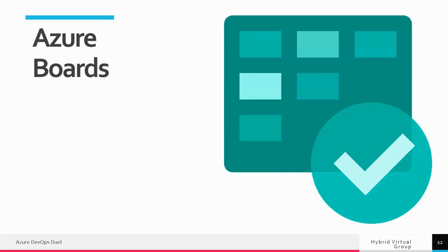Anyway, we better discuss Azure Boards since I'm going to be using it to organize our backlog items. Now, Azure Boards is the service within Azure DevOps that you can use to manage your work items. It can use basic, Agile, Scrum or CMMI templates for each project that you create in Azure DevOps. As you saw earlier when I went through the organization settings, these templates are also called a process. Now, Sander, because we are using Scrum, we're going to want to use a project based on a Scrum process. For now, we can keep it as standard, but we can customize these processes if we need to. For example, we can add additional columns to our work items.